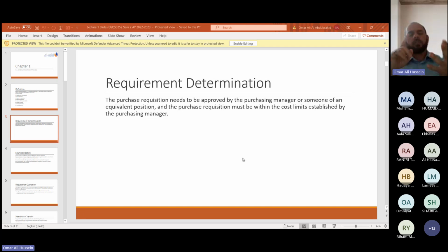Everything: procurement, checking the subcontractors, what the project requires, the invoices, the materials, the quantity surveying, even sometimes the contracts in that area specifically. He will be responsible for approval of these contracts. So he's a project manager, but for a small portion of the project. Or not, that doesn't necessarily mean a small portion, but because the project is big, he will be responsible for a part of the project.